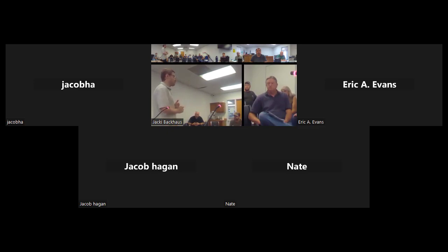And for severance, we assumed 5% of the total farm. So that's all of the connected parcels together. So if you have a 240, it's 5% of that value. If you have an 80, it's 5% of that value. That's how it's estimated.